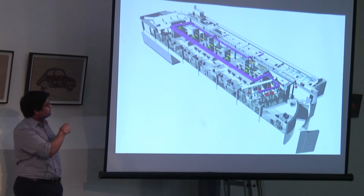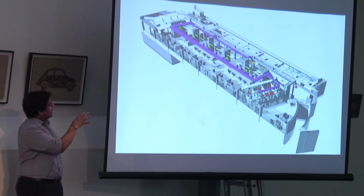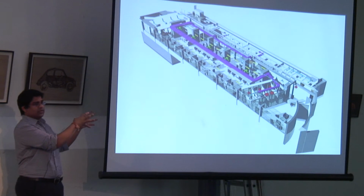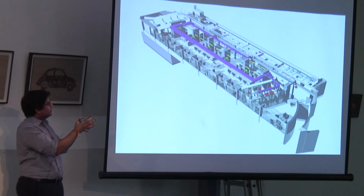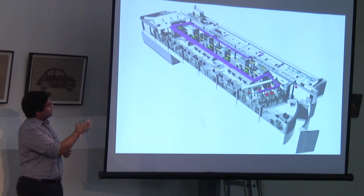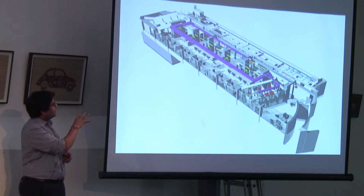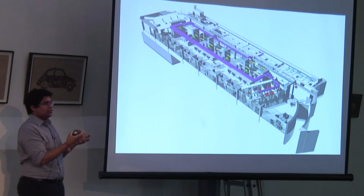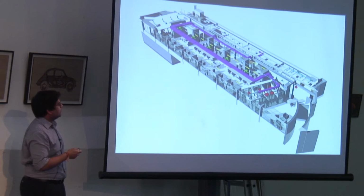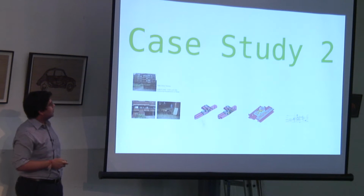Here, for example, is a refurbishment that we did for some area service for the local authority as well. The M&E was actually all designed by the contractor, so they had that information already. We could append that to our as built model and hand that over to the client, so they could, for example, run their facilities management and look for where the filters might need to be changed. So there are already subcontractors who have the models, but they might not necessarily be asked to hand them over. So that kind of ability has sort of been lost.